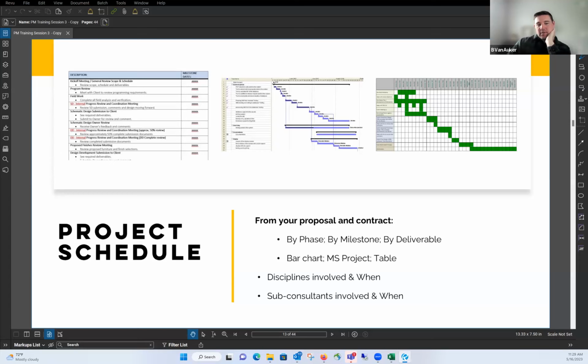Sure, I can mention something. For a lot of our Avant-Grid projects, some of them are resource level to some degree, but certainly by quality gate or milestone, and then all the tasks in between, we use Microsoft Project almost exclusively. But for some one-off projects, we've used Excel just to make sure that we've mapped disciplines, deliverables, and the work so that we can communicate internally, to your point. So my point is that we have some pretty sophisticated schedules all the way down to some rudimentary ones, just to make sure that we have alignment.